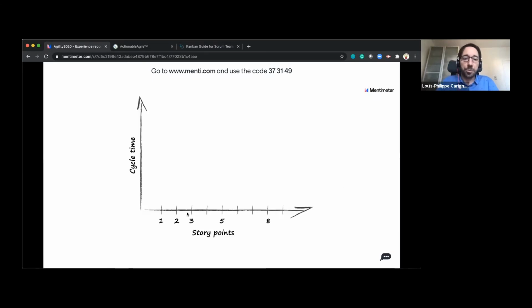So I'm going to put on my x-axis here the story points that we've known for about 15 years. Lots of teams I've worked with have put story points at the bottom here, with 1 point on stories that are easy, 2 points, and 3 pointers. Medium difficult stories are 5 pointers, and you might have harder ones at 8 or 13.